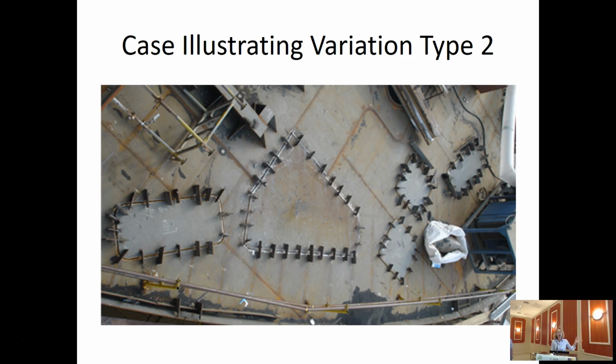One representative example from the maritime industry is scope outfitting equipment, uncertainty in scope outfitting, uncertainty in design. Information on design uncertainty in scope outfitting usually comes after the project start, and it's not uncommon that it comes late into the execution phase. To give an example from our case, 2-3 years ago there was a vessel where the customer came 2 months before the delivery and wanted complex firefighting equipment installed. Of course, this is not the type of change you can buffer for.